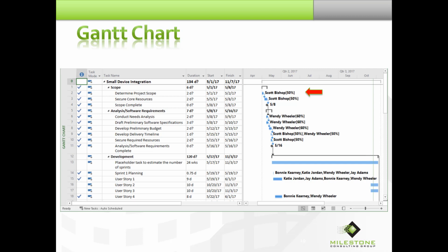We have some non-agile activities at the beginning of the project. These are things that have to happen. They're sequential. And then we're going to do agile development. And so we estimated the duration of this agile development and recorded it in a placeholder task. Now, determining the length of that was actually very easy. It's based on velocity and estimated story points.